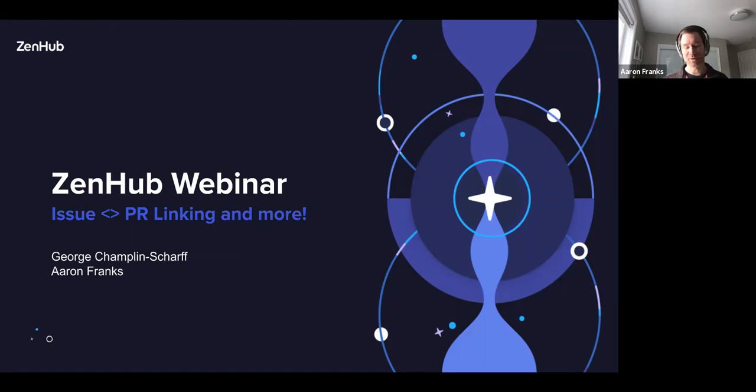And again, the biggest determinant we've found is just the size of your PR. If you drop a 3,000 line PR on your team, that's going to slow things down for sure. So it's always a challenge to break things down into small pieces, because you want to make sure it's not death by 1,000 cuts with 30 PRs a day, but also that you're able to ship things quickly. So it's a bit of an art, I would say, to sizing those PRs, but keeping them manageable is a big thing to stop it from being a big blocker in the workflow.